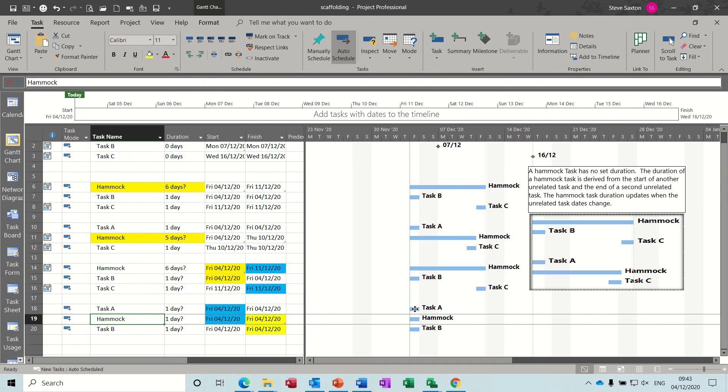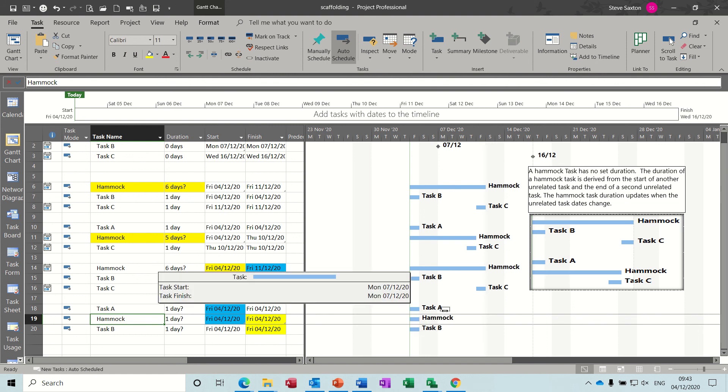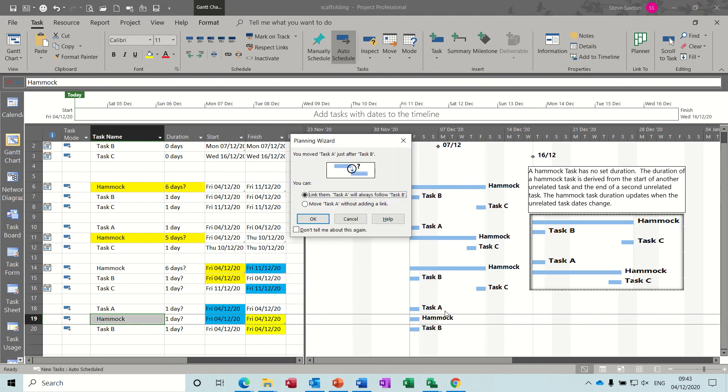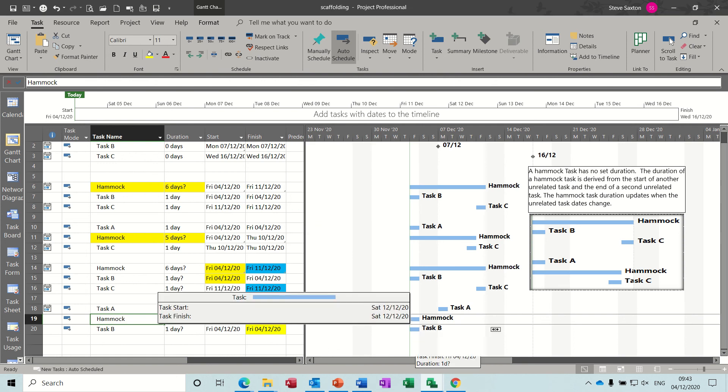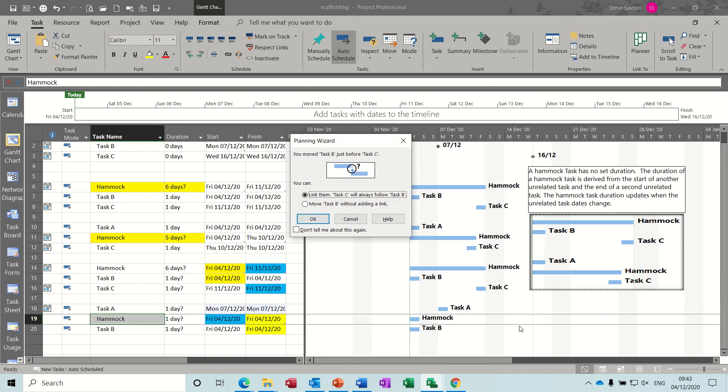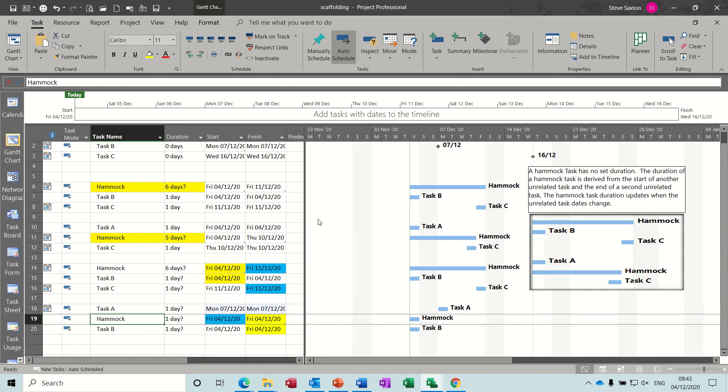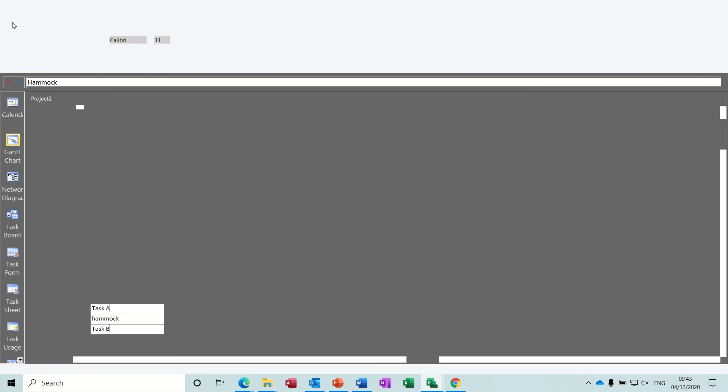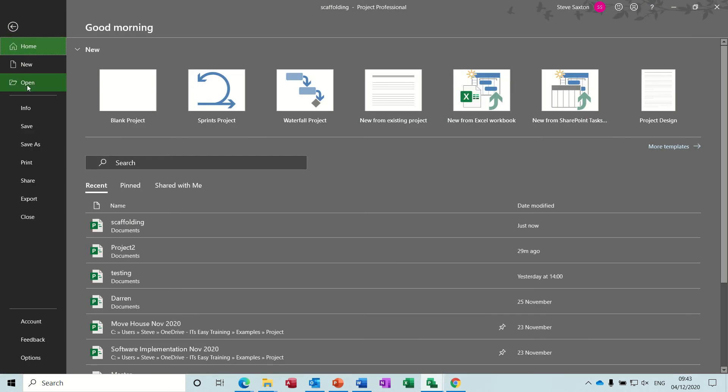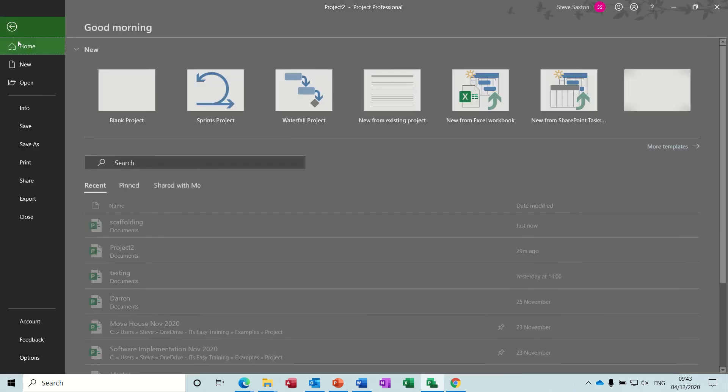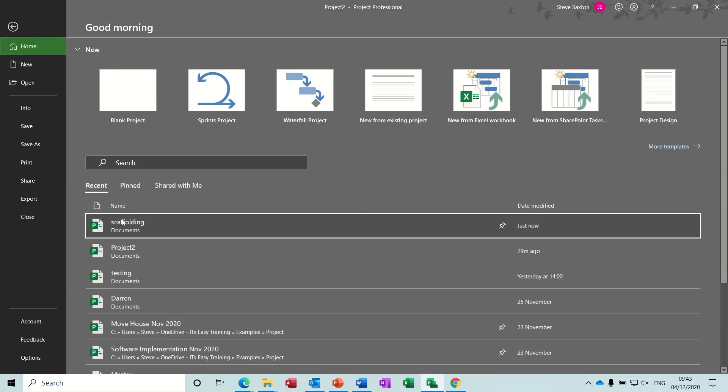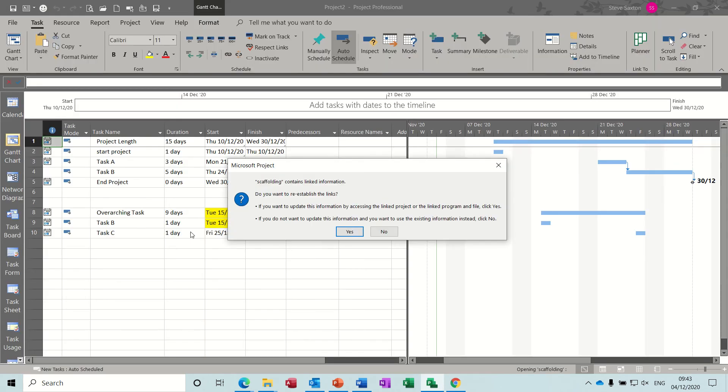All right, so the duration - at the moment everything's on the same day. So let's say the start goes forward a week, I don't want to link. And the end of this set of tasks goes into next week - say no link, okay. Now the hammock should come across, move across and sit between these two.